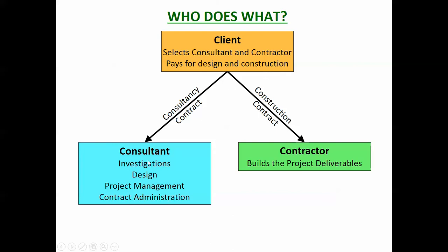Then you've got the consultant. The consultants are normally people like Becker Carter, GHD, and they are specialists in doing site investigations, developing designs, and doing project management as well. They will do the site investigation, they'll do the design. They may be asked by the client to manage the project on his behalf. In other words, to hire the contractor, to manage the contractor and all that sort of business. And they'll be doing the contract administration too. So once again, acting on behalf of the client when the project is actually being constructed.